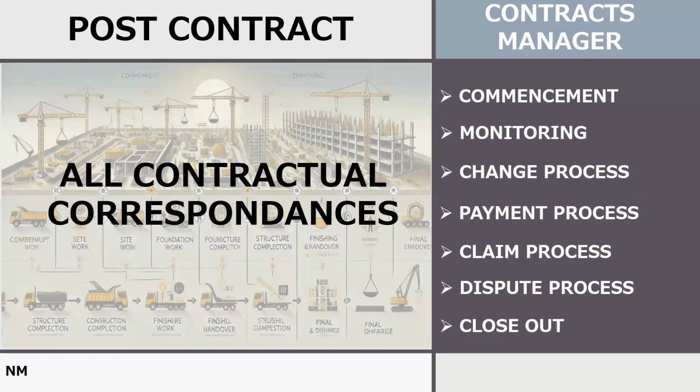If there are any disputed variations or any items due under the contract, we have to put all of that into the statement of completion when submitting it. That is the obligation of the contractor when it comes to payment. But if you miss that, the employer will be discharged from all liability for those due payments under the contract. So see how important and critical it is to the contractor.